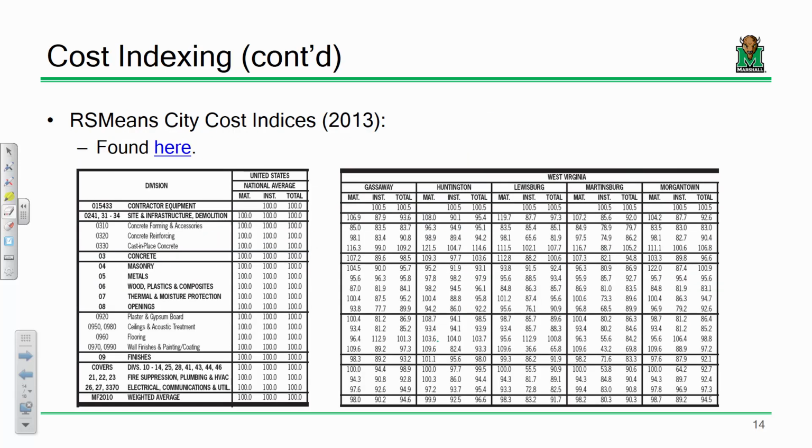Okay, and if you go to the RS Means guides in the back, and there's also a link to download these as well, the link is from the location indices in 2013, but it really doesn't matter because you're dealing with time using historical indices. With city cost indices, the time is fixed, and it's really more about location. If you look at city cost indices, you'll see that they're listed. We have our national average, and you notice the national average are all listed as 100s.